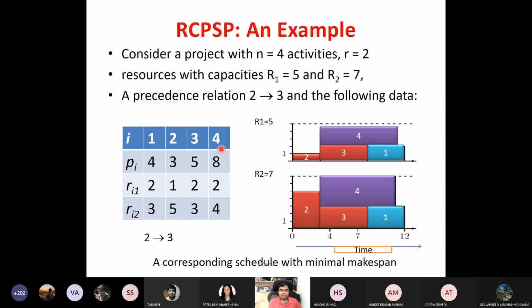So if you look at a process, meaning job 4, it requires 8 unit time. And for 8 unit time, it needs 2 plumbers and 4 electricians, for 8 days. Okay, so in that way.